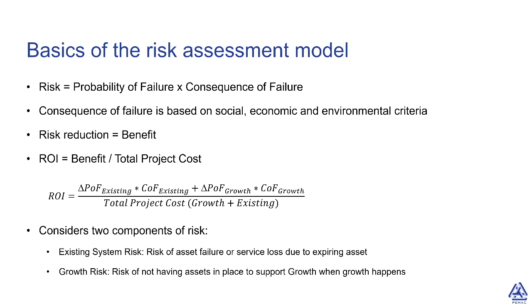We also consider what we call growth projects alongside existing system. So now if we're in that kind of competition of do we fund projects so we can enable housing versus projects for fixing existing system, we can evaluate them side by side under the same kind of criteria. So we look at the whole return on investment of any project. What's the benefit to the existing side, and what's the benefit to having more housing and more growth in our communities?